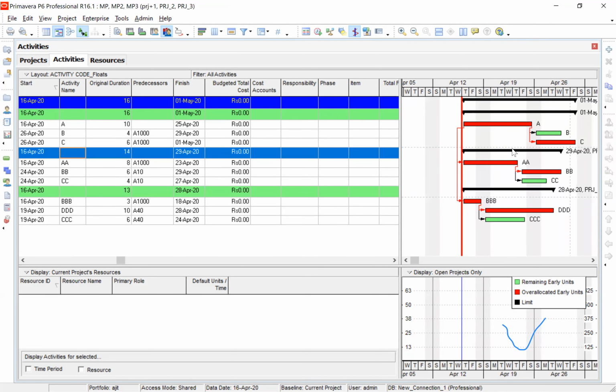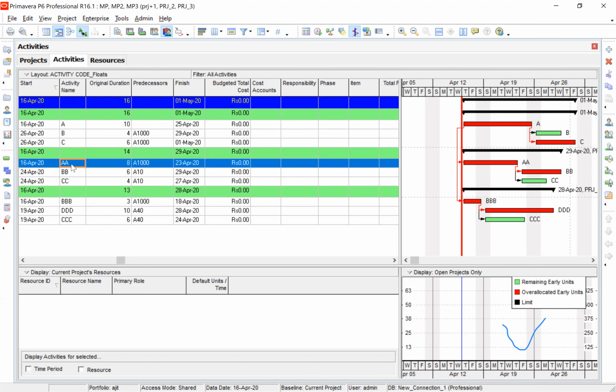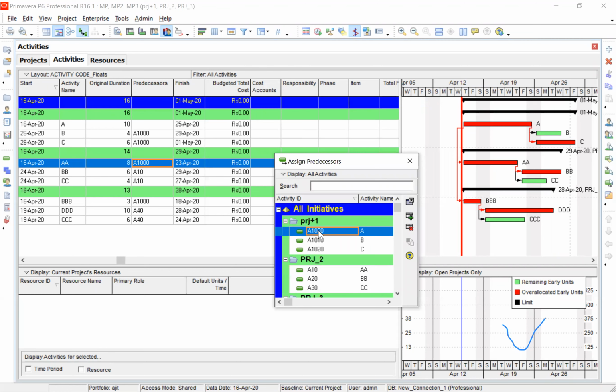All right. And the only thing that I sent in the tutorial, which you also saw in the video, I'm repeating once again as a review: if you want to stagger the first project and second project by 15 days, what you will do is select the first activity of the second project, and in the predecessors, you can select the first activity of, let's say, the first project.